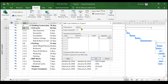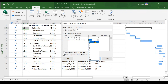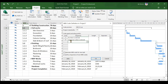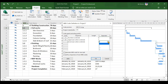The separator comes into picture when you define the second level. For the second level, we will use uppercase letters with a length of one and a dot as the separator. For the third level, we will use lowercase letters with a length of one and a plus sign as the separator. So we have now defined three levels.